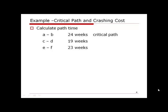The first step is to calculate path times and identify the critical path. We have three paths in this project: ABD, and EF. The time on each path is calculated, and path AB has a time of 24 weeks, which is the longest, making it the critical path.